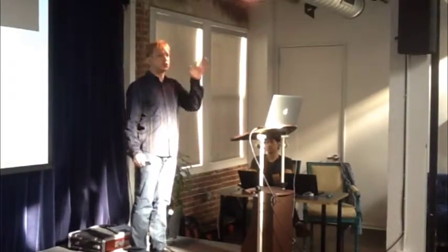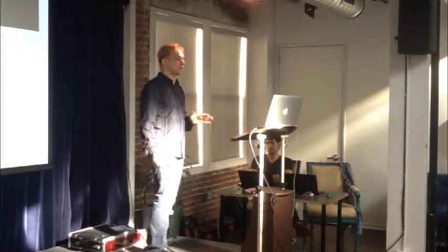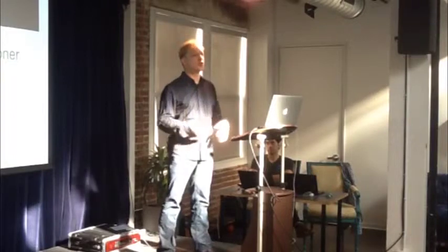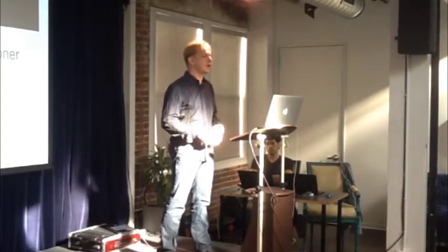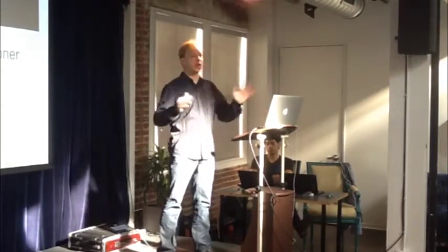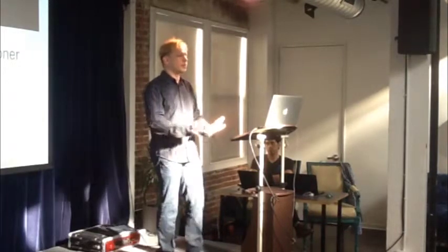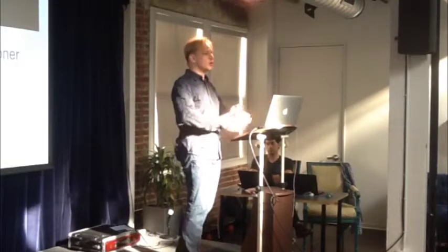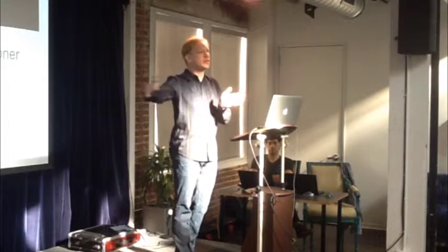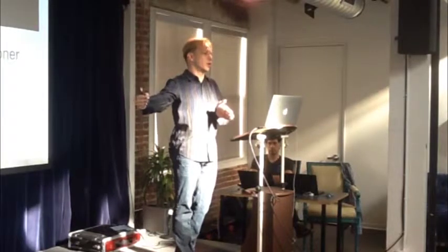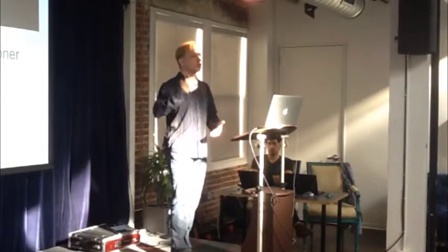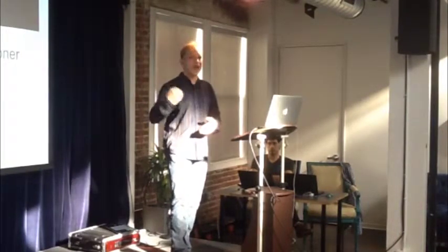The first is to use some sort of Agile software process. I don't mean capital A Agile. You don't need a certified Scrum Master. If you don't know the difference between a chicken and a pig, I'm not worried about that. What I care about is that you're not diving in on a single plan, doing a single estimate, treating that as a product, and expecting that to be the end of the budgeting story. What you need to do is iterate, run short iterations, and repeat your financial review at every iteration.